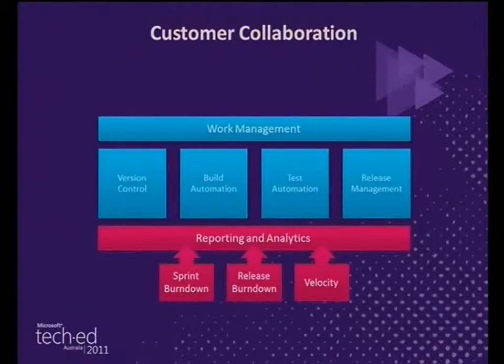We've had a project recently where our team had dependencies on other parts of an organisation, and still do. And what we did with that particular project was start publishing the impediments report every single day. I think it was something like 8 a.m. the report goes out, and it says, here are the tasks that are blocked, and here are the specific impediments we've got. And so this is all about building an engine inside an organisation so that they can rapidly develop and release software, and it exposes those issues quickly.